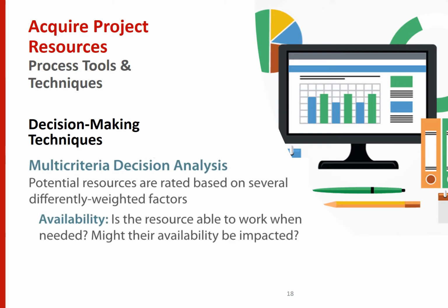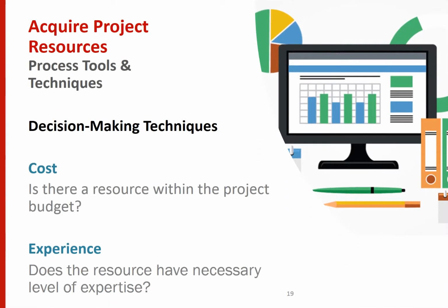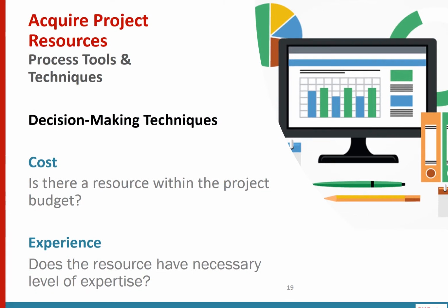Some of these factors include availability. Is the resource able to work when needed? Might their availability be impacted? Cost. Is there a resource within the project budget? Or are they exceeding the budget constraints? Experience. Does the resource have the necessary level of expertise required?